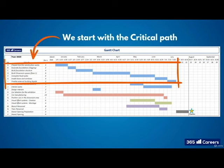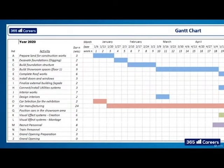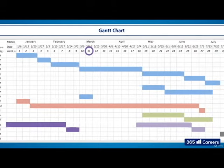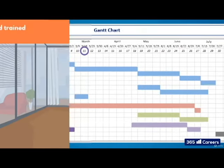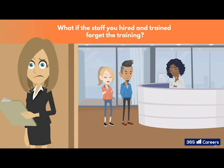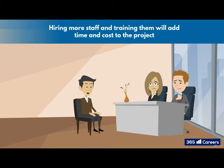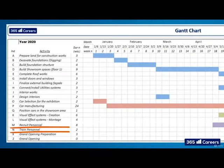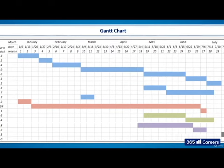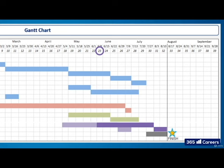For now though, let's look at how our activities fit into the chart. We'll start with the critical path. Makes sense, right? So A is our first task. That's the easy part. As the project manager though, it's your job to decide when to execute the other streams. So think about this. M, recruit personnel, is a nice quick activity which you could start immediately, with N, the interview process, starting soon after. This means you could have the whole stream complete by week 11, but that leaves a long time before the showroom is set to open. What if the staff you hired and trained find other jobs, or they forget the training? Hiring more staff and training them will add time and cost to the project. So with that in mind, it seems that the best thing to do is to start the process at week 23, 11 weeks before the project is due to be completed, right?